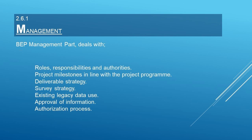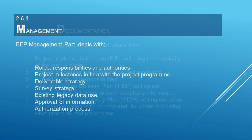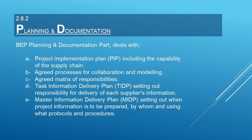The management part also covers deliverable strategy, survey strategy, existing legacy data use, approval of information, and authorization process. The planning and documentation part deals with the Project Implementation Plan (PIP), including the capability of the supply chain, agreed processes for collaboration and modeling, agreed matrix of responsibilities, Task Information Delivery Plan (TIDP) setting out responsibility for delivery of each supplier's information, and Master Information Delivery Plan (MIDP) setting out when project information is to be prepared, by whom, and using what protocols and procedures.